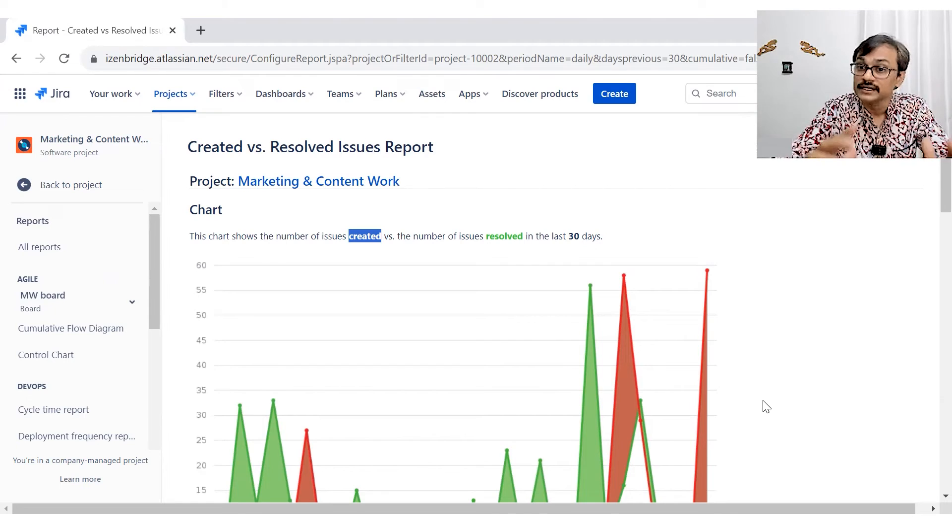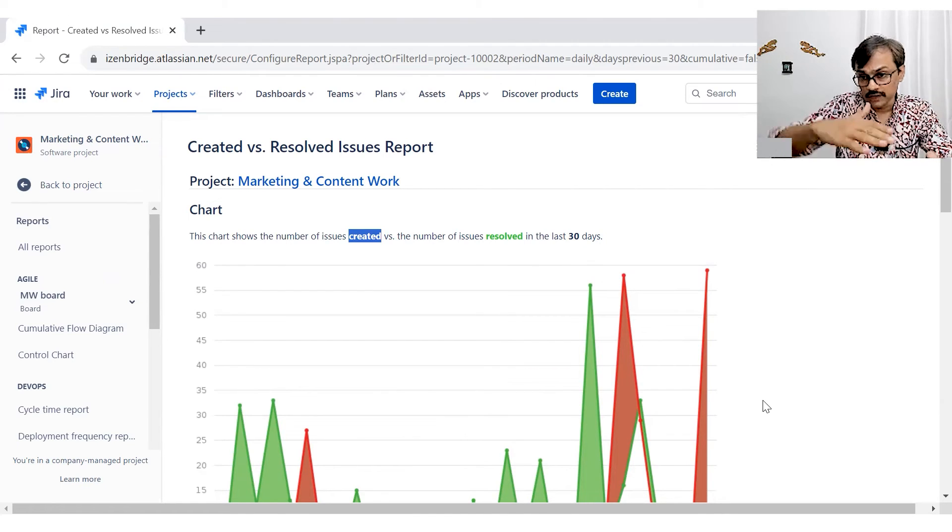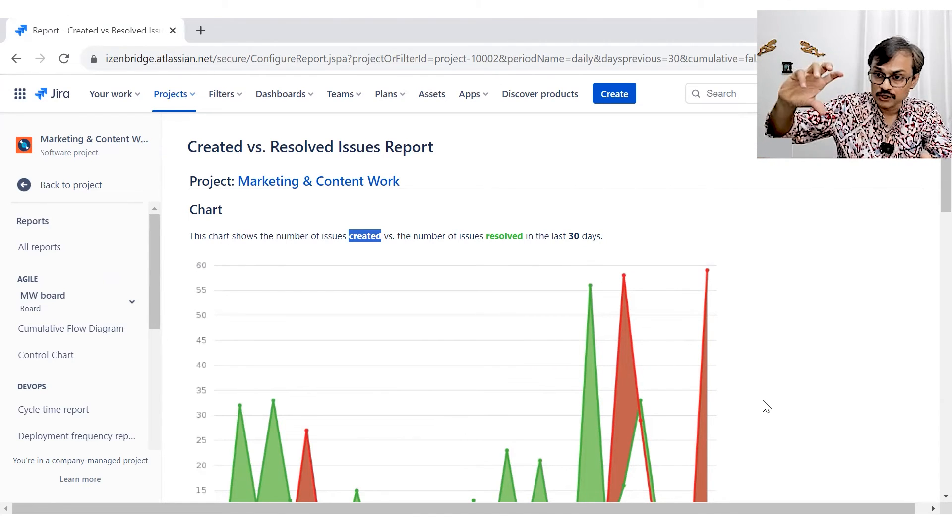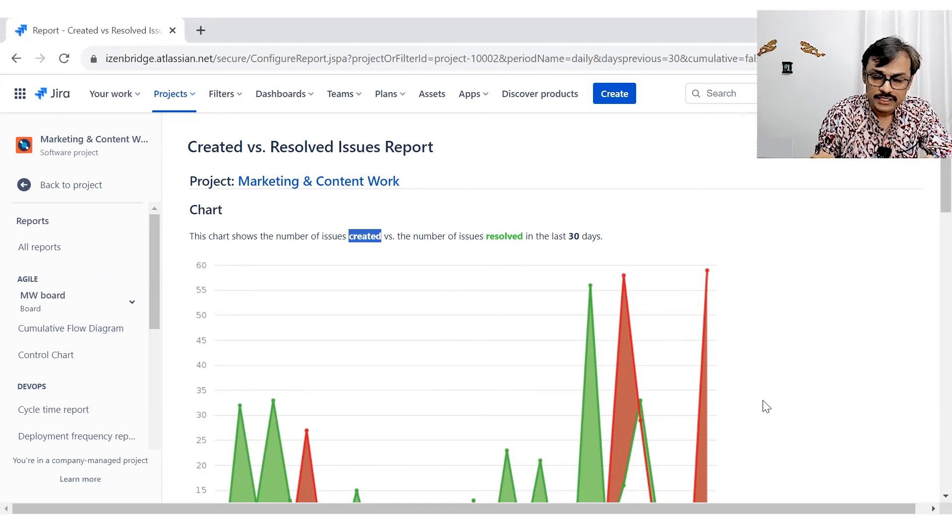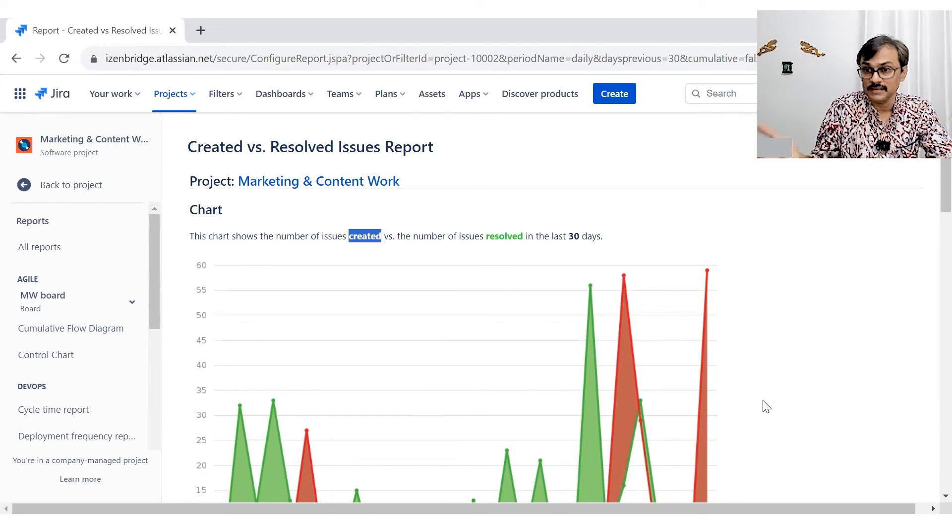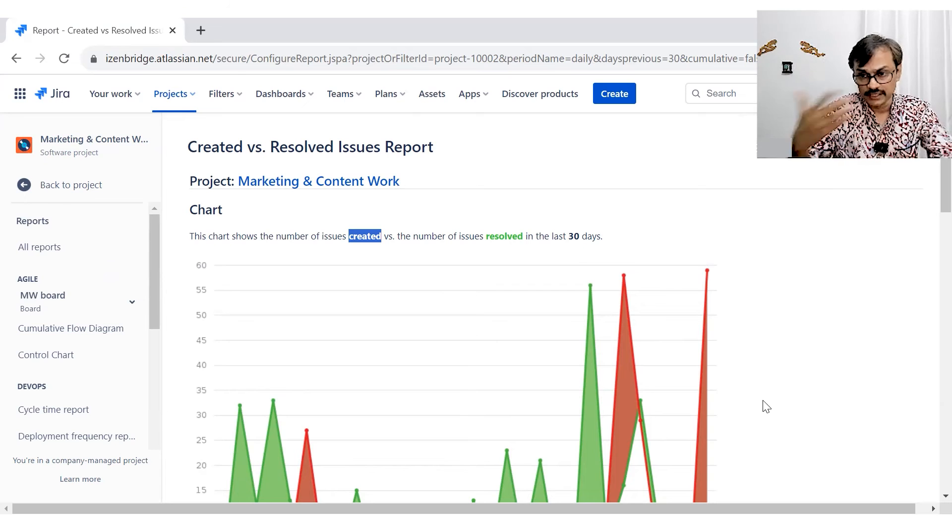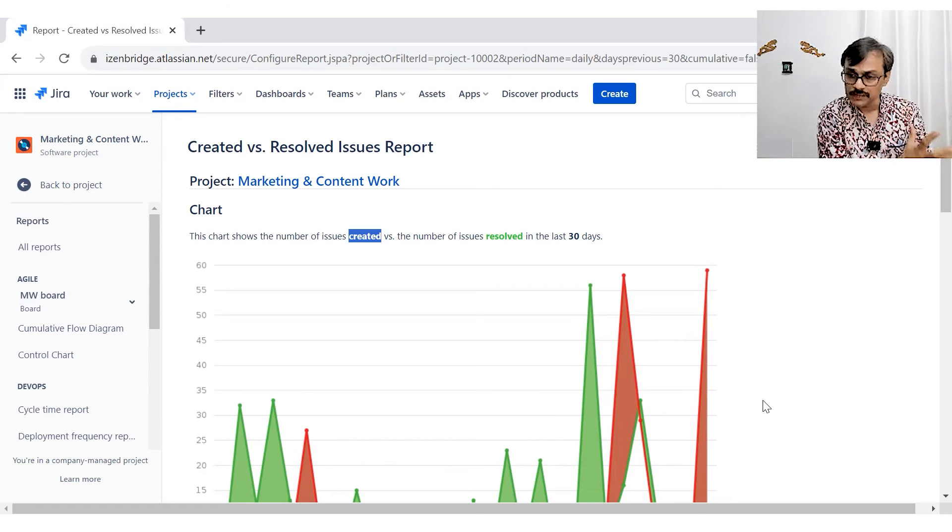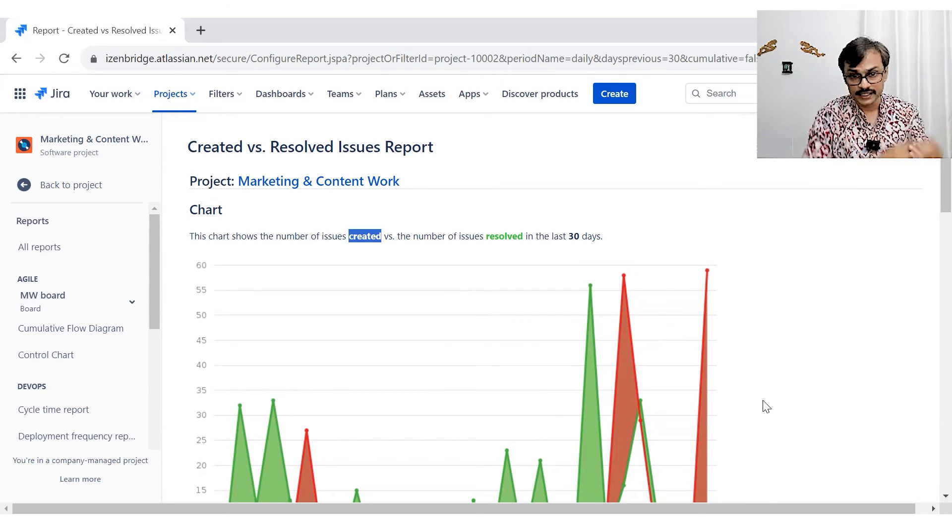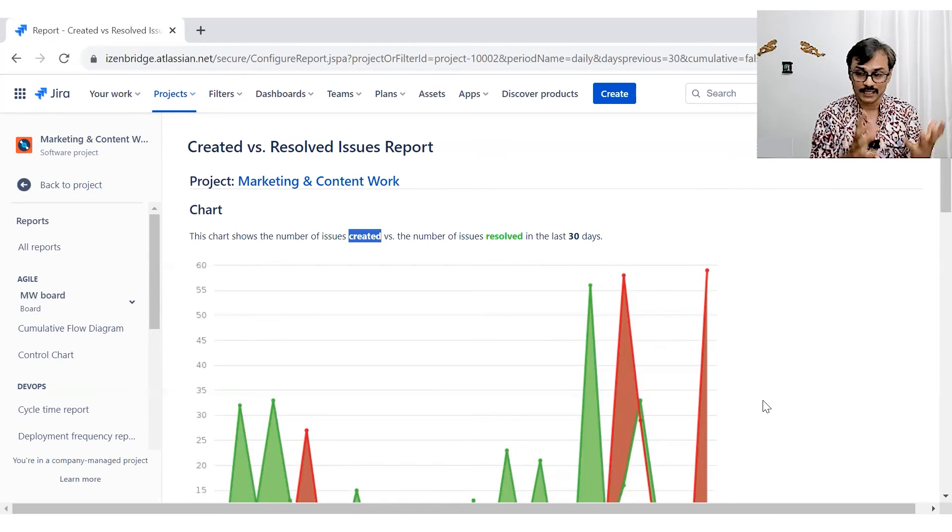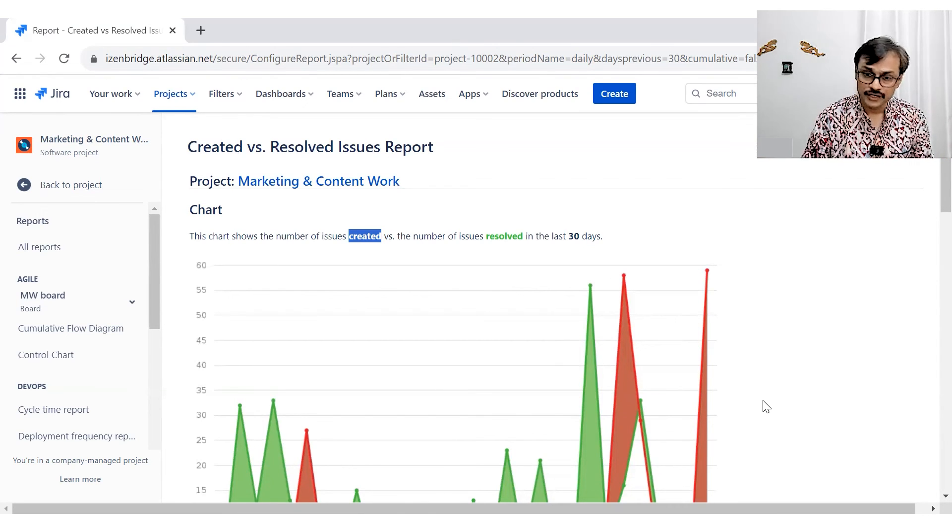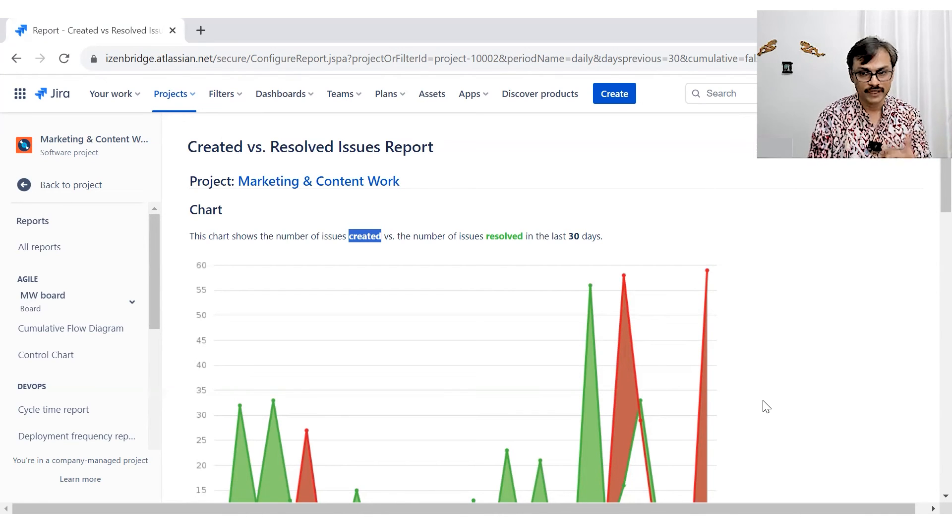You may get worried if the work is not getting created also, maybe you are resolving, resolving, resolving, and the created is not coming in. That could be also an area of concern because after some time, the team may not have work for doing things. So we may need to work with the upstream to ensure that some work get created. So it's not only a resolution is our focus, sometime as a project manager, scrum master, you also need to worry about the created issues.